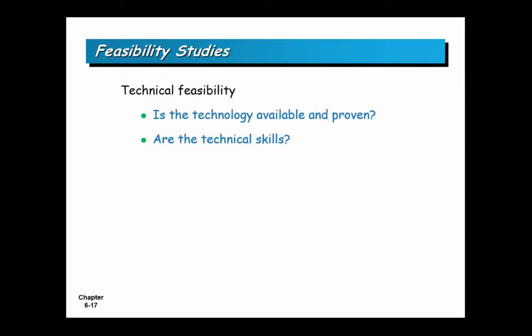Technical feasibility asks: is the technology available and proven? Can what you want be done from a technical perspective? You also decide how far on the leading edge you want to be — leading edge means taking more risk. And do you have the technical skills needed, either inside your company or attainable from outside? That's technical feasibility.